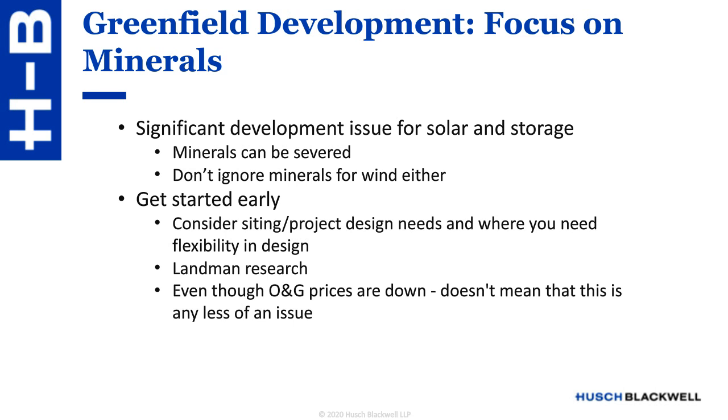We've had a situation with a wind developer who had a highly productive area of the state, and that county was really busy with minerals. Being a wind project, they weren't too concerned about balancing out those interests, but ended up with a pretty narrow corridor for their gen-tie line, and discovered late in the game that it was an area a mineral developer also had targeted for production. So in all the renewable areas, it's something you have to think about.